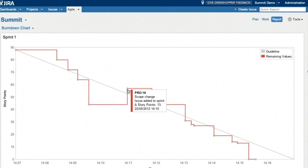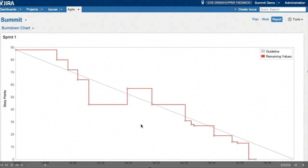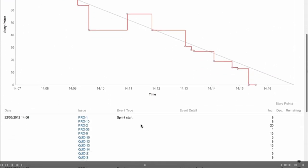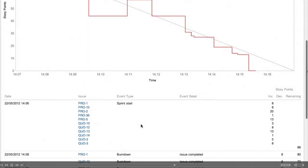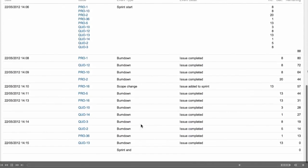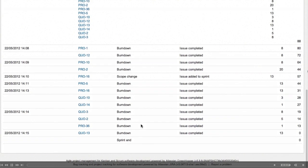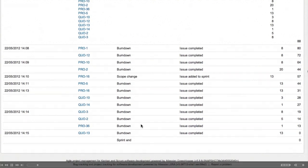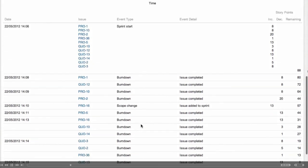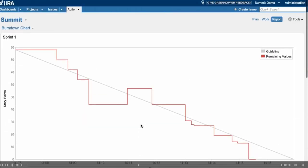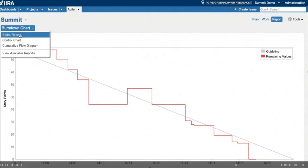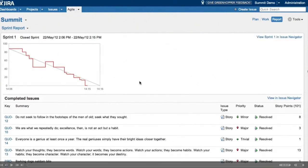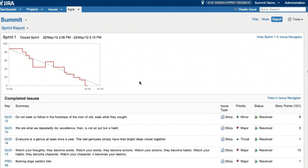And if you need more detail about what happened in the sprint, if you scroll down, each event is listed and exactly what happened is there. So no more arguments about yes, it was in there when we started or not, because it's all down there in black and white. And another interesting report is the sprint report. So this one has a baby burndown at the top. And then below it, every issue that was part of that sprint, whether it was completed or not, is listed below with more detail.